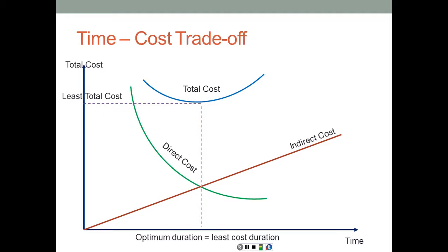Remember that if you have two critical paths and you compress one activity on each path, that results in only 1 day of shortening of the project, because these paths are in parallel. So it's not that you compressed 1 day on activity B, for example, and 1 day on activity C, but since they are on parallel paths, that resulted in only 1 day of compression to the whole project.